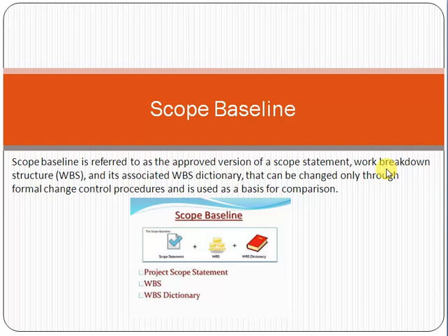The major work is to construct the house, out of which one work is external work, and in the external work you realize that you have to paint the front side of the house. So you decide how much cost and effort is required. You are dividing the work until you reach some level at which you can estimate the effort and cost of a work.